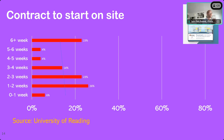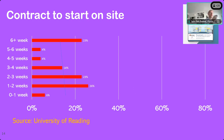That two-week window covers the fire compartmentation. We are increasingly seeing design responsibility — if not full CDP packages — being awarded without allowing time for the development process to happen. During the invitation-to-tender period, everybody is offering an indicative price, but once awarded, the rubber hits the road and the detailed work starts. We are seeing the design development process crashed into a really condensed period of time, and inevitably within that we're starting to see challenges.